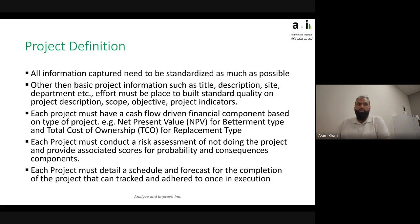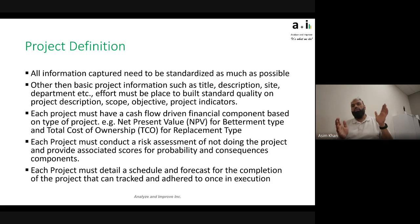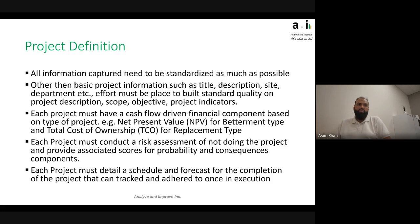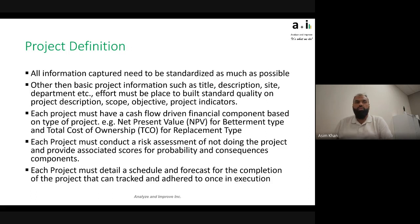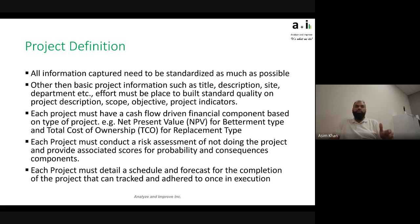Each project must conduct a risk assessment of not doing the project and provide associated scores for probability and consequences — the two main lenses being financial impact and risk reduction. Each project must also detail a schedule and forecast for completion, so it can be tracked once in execution. This serves two purposes: making sure that once a project is approved we keep on track, and helping supply chain be better prepared. At the validation phase, we'll also want to see how good we were at forecasting and scheduling, which will improve things in future.